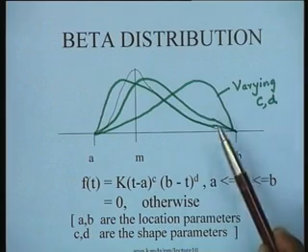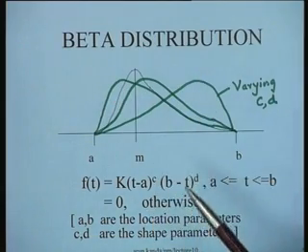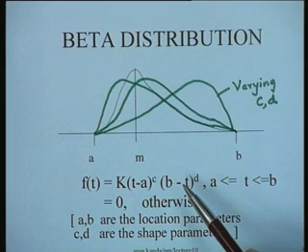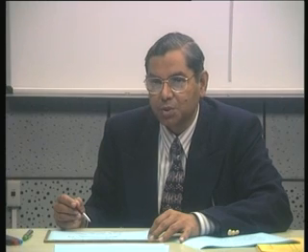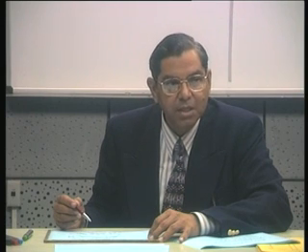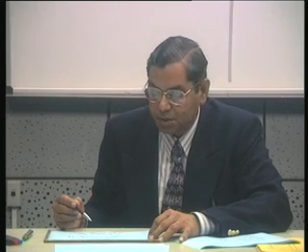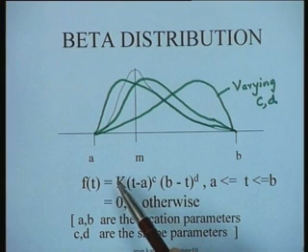You would see very easily from this example that the beta distribution is in fact a 4-parameter distribution. If you compare it, for instance, with a normal distribution, that is a 2-parameter distribution, the two parameters being mu and sigma, the mean and the standard deviation, or the mean and the variance of the distribution. Notice that k is not a parameter. Why is k not a parameter?